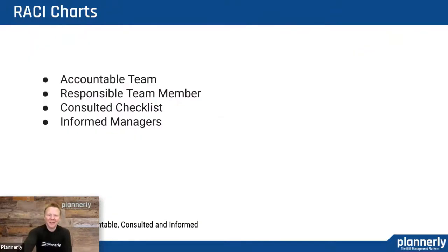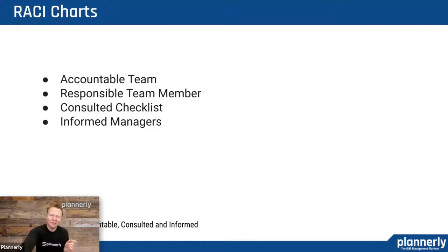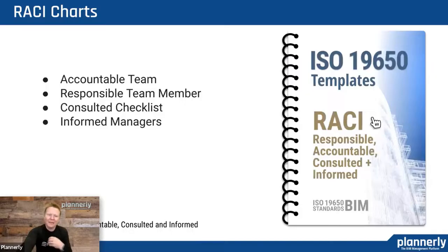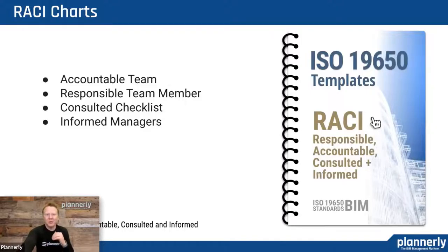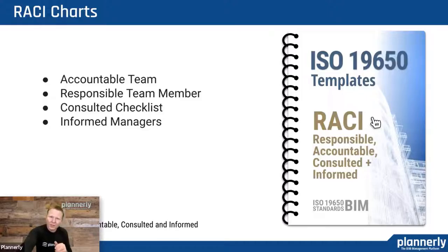And then RACI charts — lots of people pronounce these differently. How do you assign accountability to a team, responsibility to a team member, and then have consulted people at the right times and people that are informed about the ongoing results? So it really is: responsible, accountable, consulted, informed. We really understand it much more as the team being accountable and being able to assign somebody specifically as a responsible person. Inside of the RACI charts, you see all of those ISO 19650 clauses, and then a grid to assign who is responsible, who is accountable, who needs to be consulted, and who needs to be informed.